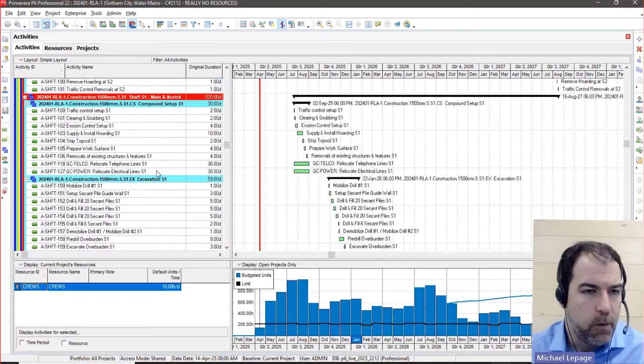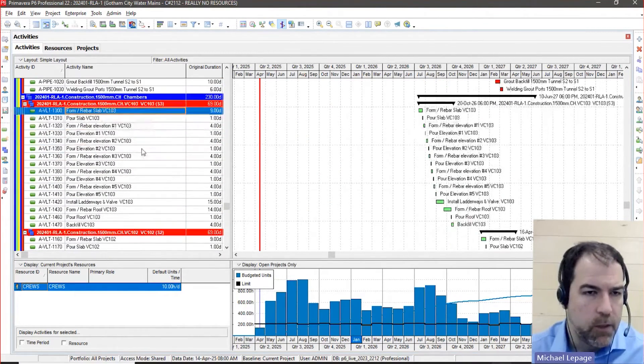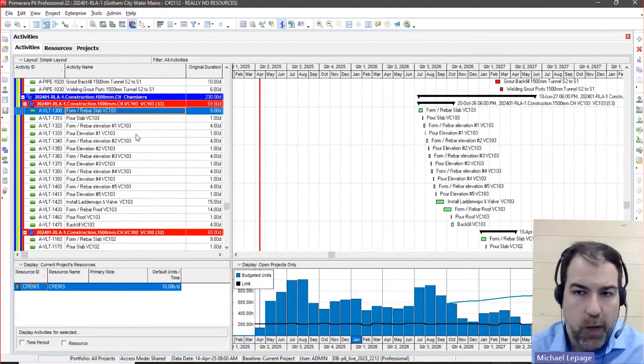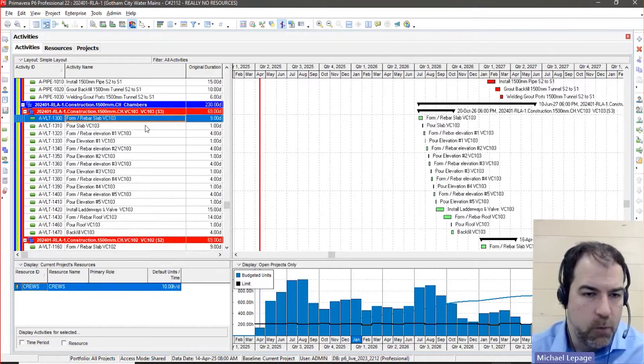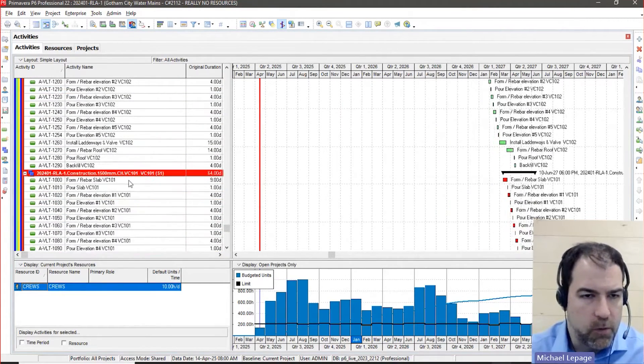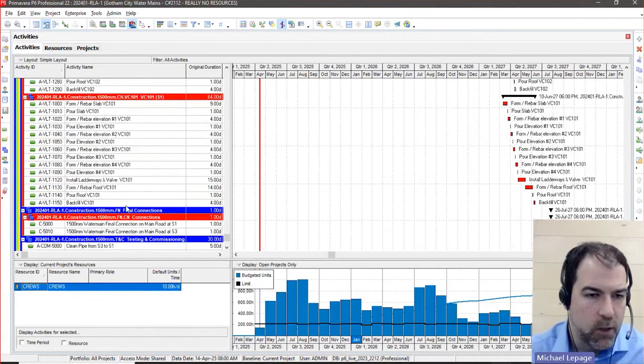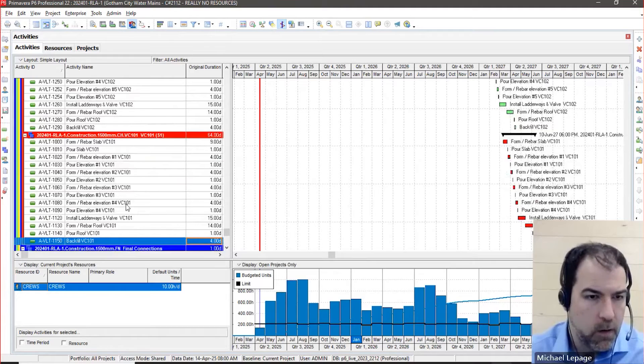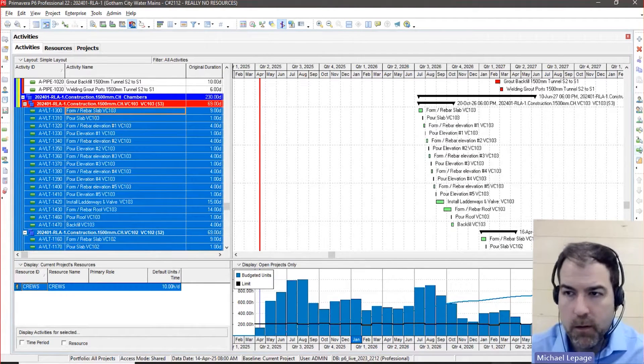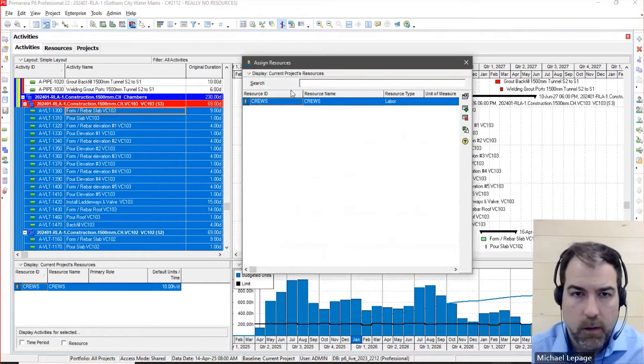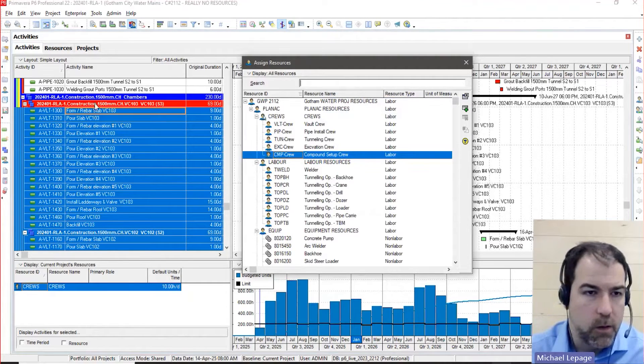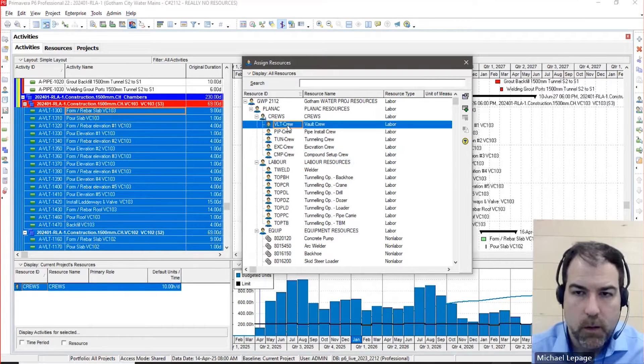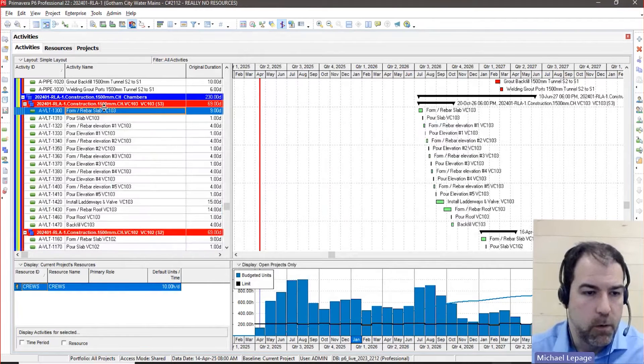For example, let's come down into we have a bunch of chambers. I'm happy to be pretty lucky because there's Chamber 1, Chamber 2, it's actually Chamber 3, Chamber 2, Chamber 1. It's all together. So I could actually, to resource load this, I could actually just hold shift, highlight those three, come over here, give me all my resources. So this is chamber work and this is done by my vault crew. There it is. Done. That part's resource loaded now.